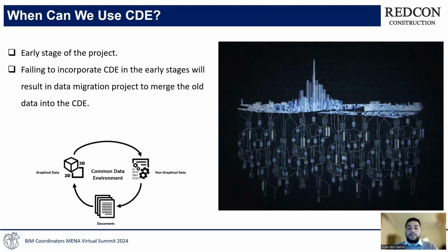So when can we use the common data environment? It is always recommended to use the common data environment in the early stage of the project. Imagine using a common data environment after invitation to tender. This would result in data migration to the project, so you will face wrong names, loss of data, loss of standards, and other IT mysteries.